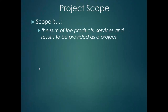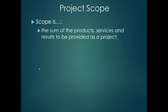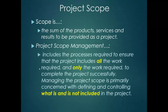What is scope? It's the sum of the products, services, and results to be provided as a project — a detailed description of the end product. For example: this project is going to involve building a three-bedroom house with two bathrooms, a double garage, and a swimming pool. The scope statement would also include a summary value — how much it's going to cost — and a time span or duration.